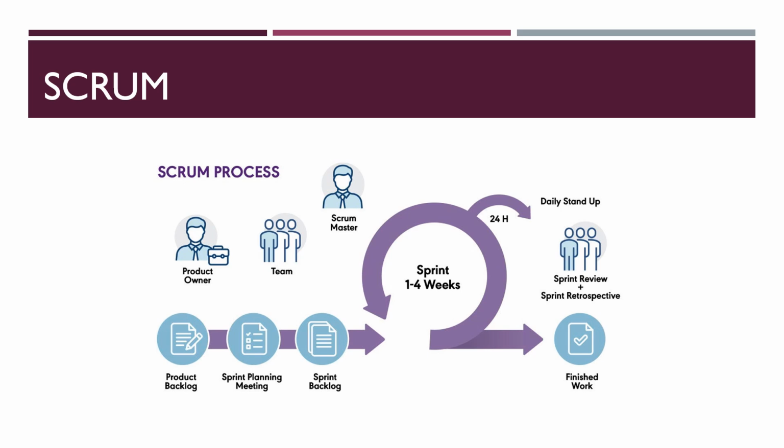Scrum is an agile methodology, and here it divides the project into short iterations, usually between 1 to 4 weeks in length. Each iteration is called a sprint. So in the agile model, inside Scrum, the iterations we call a Scrum sprint. The Scrum Master leads the team, and they work together to deliver an iteration at the end of each sprint.